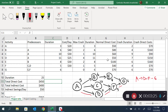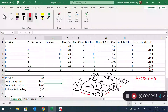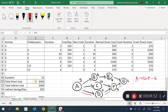For example, in a housing construction project, they could add more workers and pay additional money to speed up the process. But while speeding up, they also save money because they won't have to be on-site one additional day. We call these direct and indirect costs. Direct costs are directly related to the activities — right now the direct costs total 450 dollars.